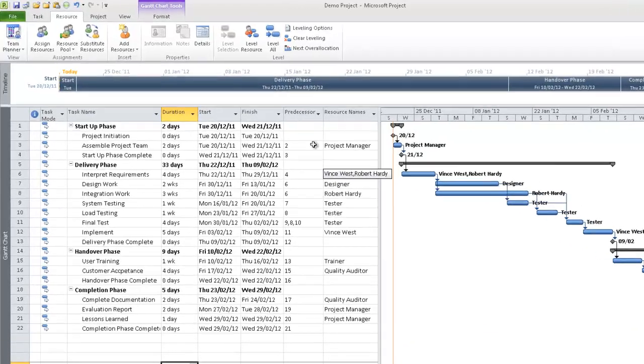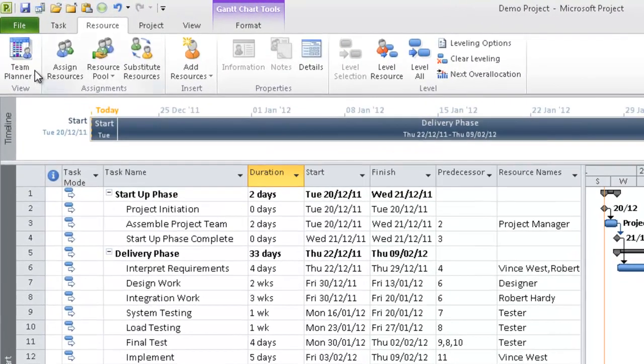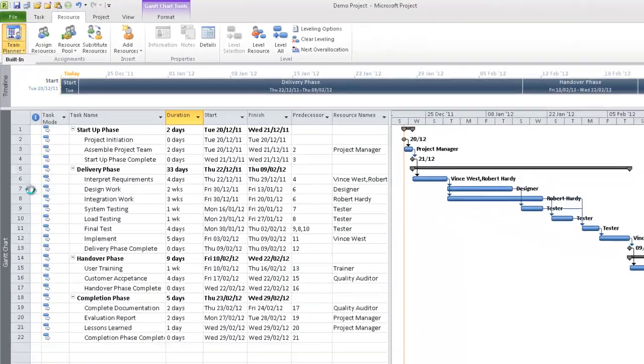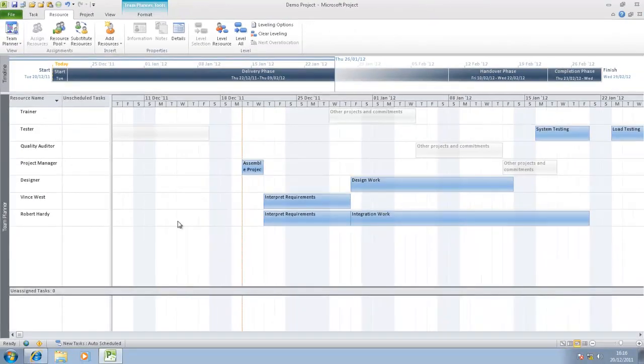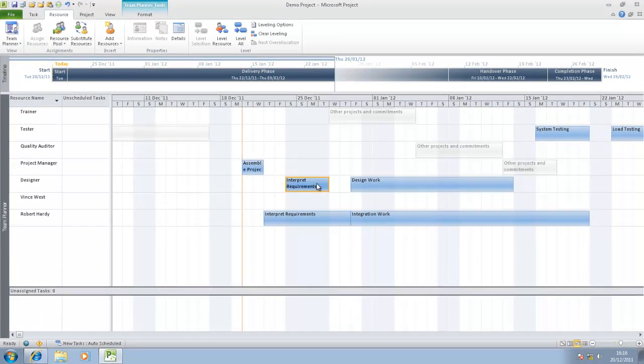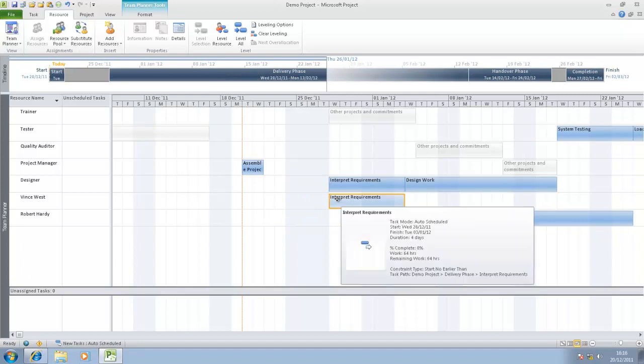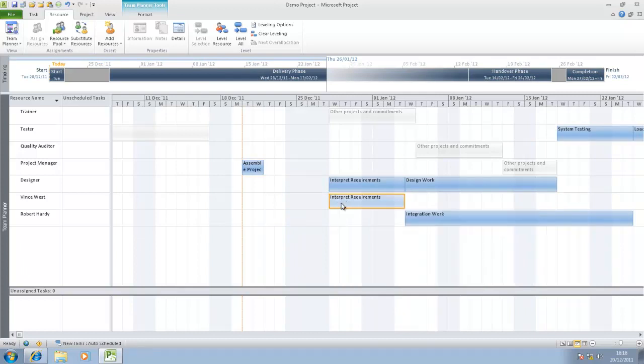Another way in which you could allocate resource or allocate work might be to go into the team planner view and click and drag the work around into different people's diaries. That's just a very high level look at how this particular feature works.